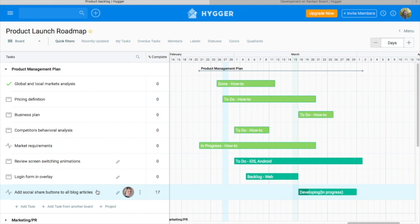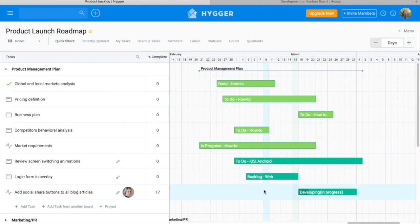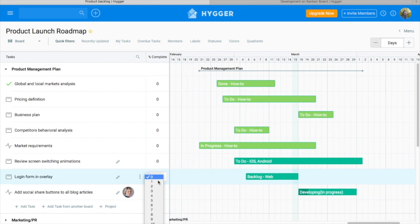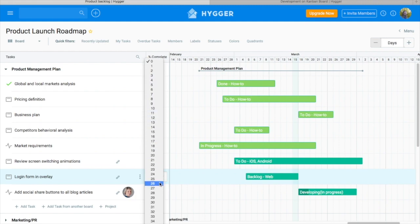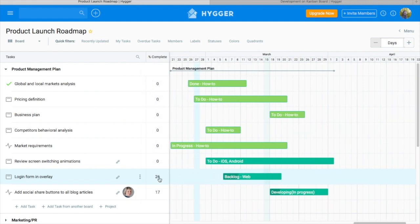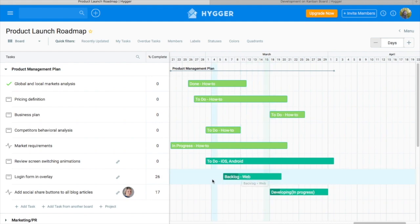During the development, product manager can show the percent of task completion on timeline. He opens the pop-up and chooses the numerical value. The task bar will be colored equally to the percent of task completion, so your teams will be visually notified about the status of the task. Now add your colleagues to the board and share your project plans with them. Good luck!